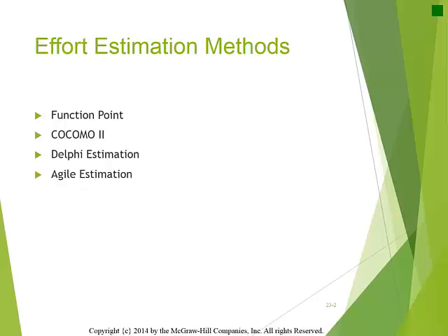If 10 person months are estimated and the project timeline spans 5 months, then the estimate would cover 2 full-time development staff members. Effort estimation is needed for project managers to plan and schedule project activities. The effort estimation approaches discussed in this lecture are function point, COCOMO 2, Delphi estimation, and Agile estimation.